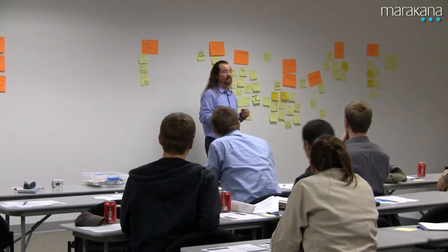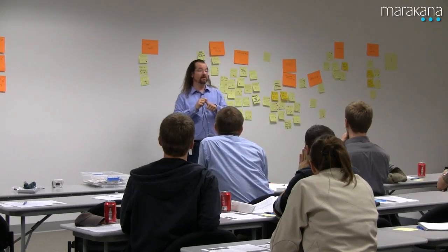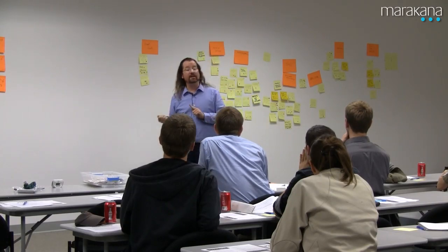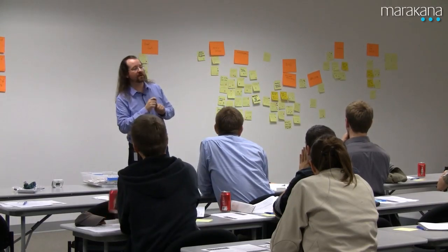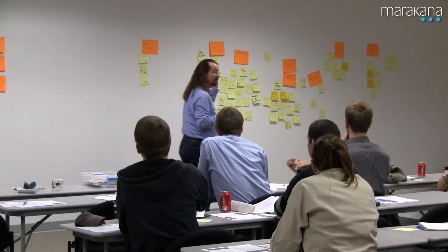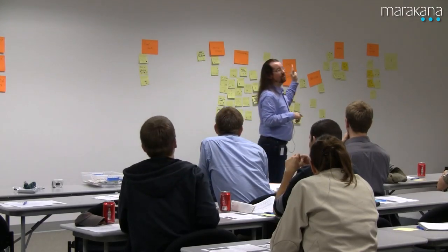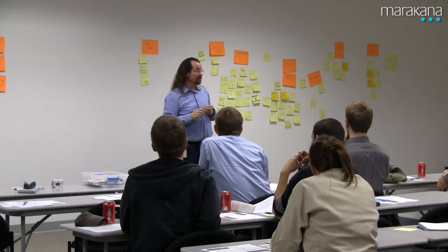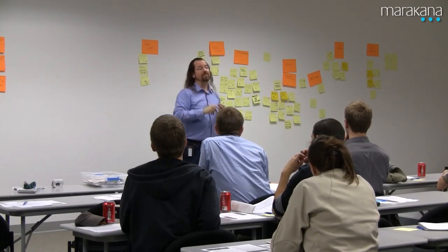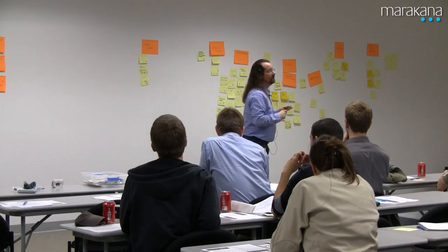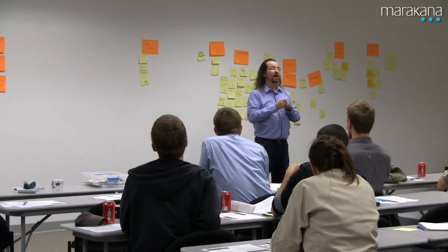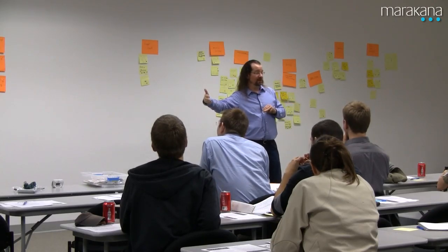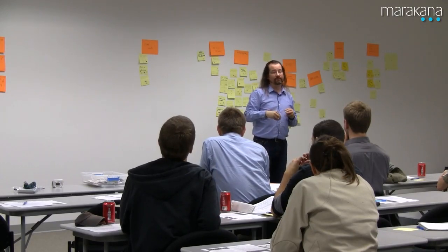What we're going to want is, generally, what's your experiment? What will it take to do it? How many people? How much time? Does it require some money? What's involved in carrying out this experiment? Some of the particulars: who is going to do what by when? Because if we're coming out with an action item for decide what to do, we want to put a fine point on it. And then finally, when will we decide if the experiment was successful and we want to continue doing it this new way, or go back to the way we were doing things before?